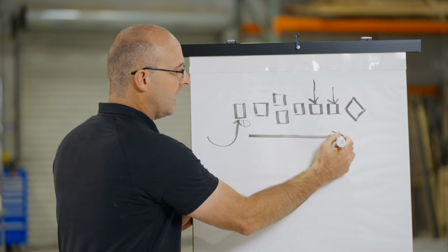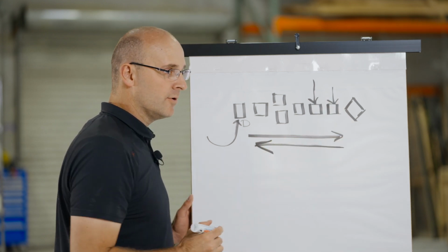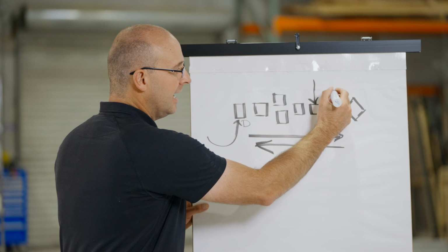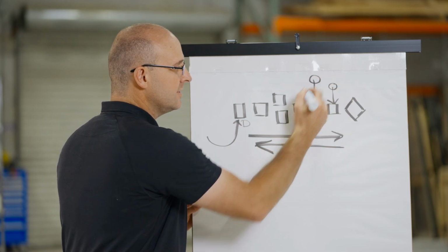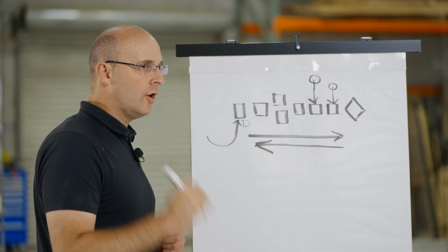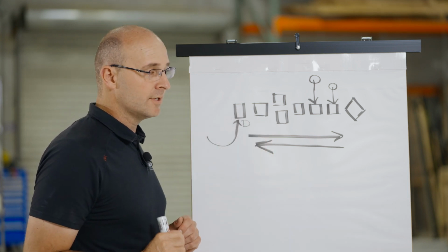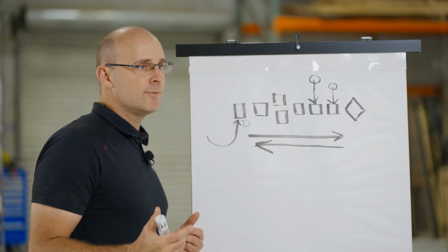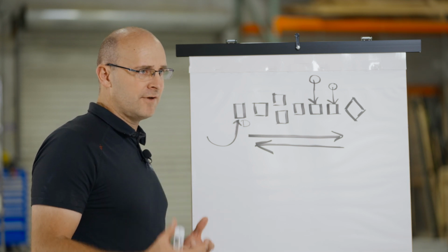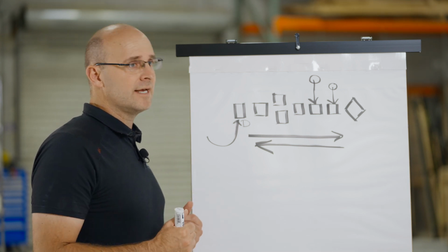And so when you run backwards, that's the concept of pull. That's based on, I can do this activity when these are done, and we identify all the needs and get all the needs on the pull plan. That's why you go backwards. So hopefully that's helpful. Now I'm going to explain the different phases of going through this meeting and this process.